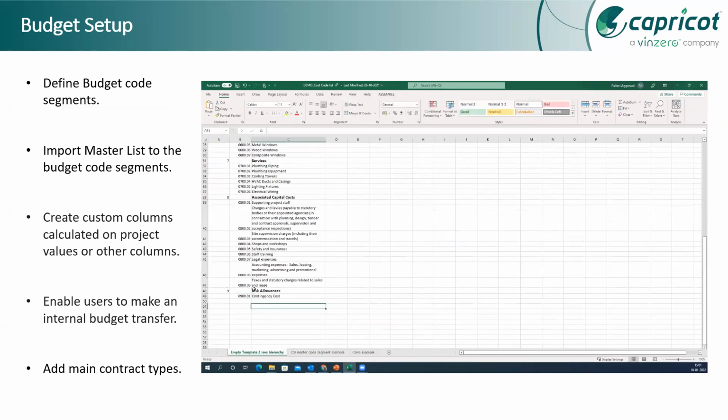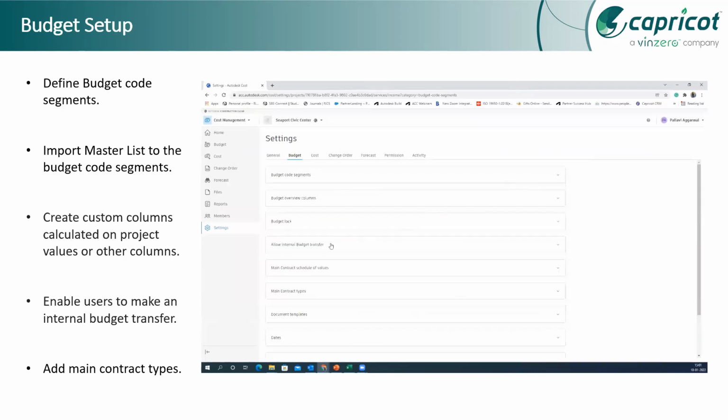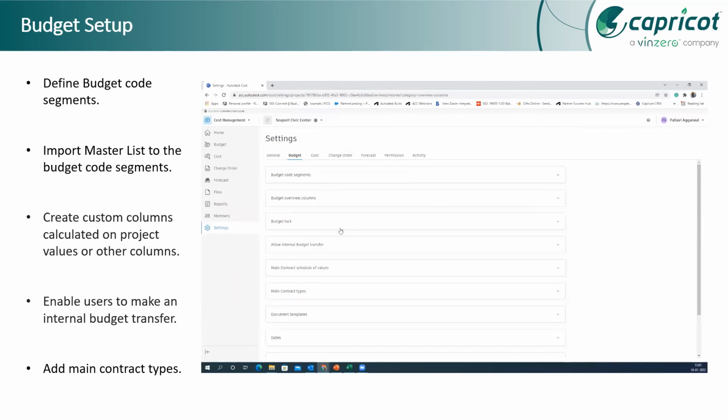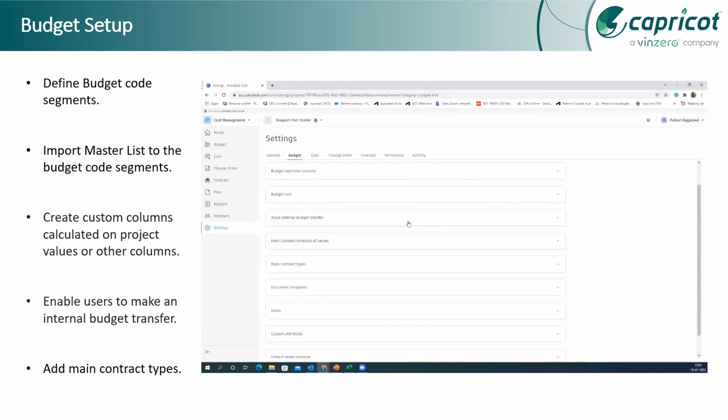Later, when we go on to the other stages, we can then see how we are creating budget payment applications. That is, once we need to create the bills, we need to check who all are creating the budgets, and what information is going to which person. So we can create budget approval workflows. We can add different people within that workflow. So let's say the budget is going from the general contractor to the owner. Those associated team members within those contracts can be added, and we can then have a predefined workflow.